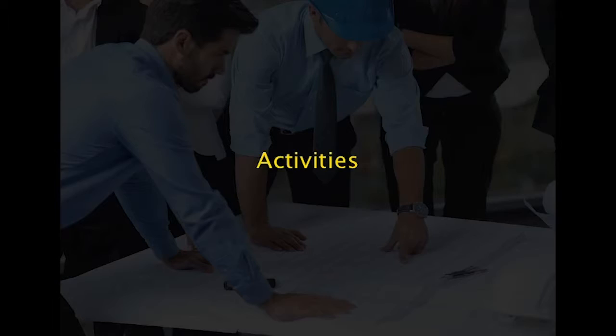Then activities. We need to list out the activities which are needed to achieve these outputs. There may be several for each output. Statements should be brief and with an emphasis on action words. Example, conducting recruitments for new teachers, providing training to the newly appointed, accommodation for teachers and conducting campaigns for families with little children. Now, we have the list of activities that are to be performed.